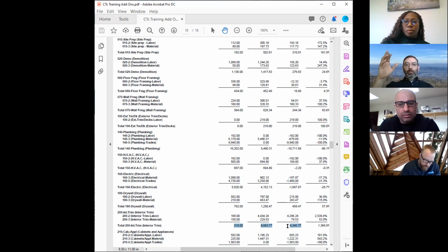How do we look at it going forward? In this case, that over-under hint would have told me something's not going the way it should. I might have pulled out my schedule projections for the next 2, 3, 4 weeks and asked, how much do I have scheduled in this project for in-house labor? Am I going to be way over budget? Do I have too many guys booked for too many hours? Or are the guys that I have missing their mark and I've got to go back and figure out how to bring them back in? So this is a key over-under item to look for when we're reviewing job costs.